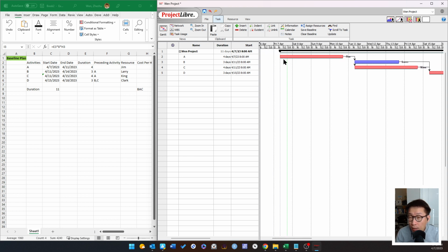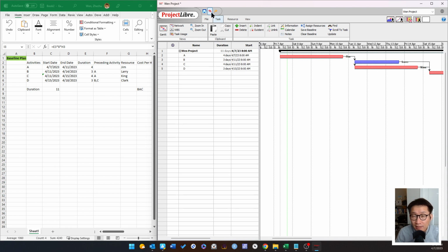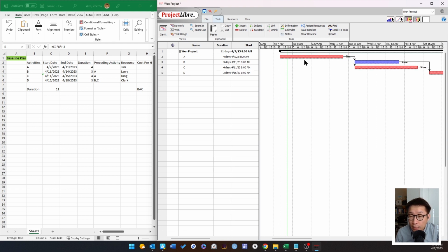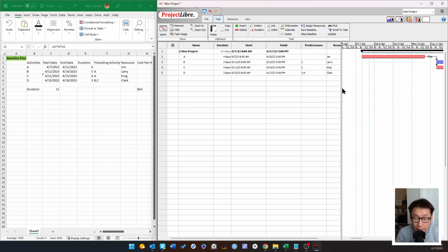This gray bar here, I don't know if you can see this or not, is basically going to be the placeholder that reminds you where your baseline was as the project progress changes. You'll see that later. As you can see, as I undo the previous step, which is when I specified the baseline, without specifying the baseline that gray bar is non-existing. But if you establish that as a baseline, the gray bar shows up. So I think we are almost done with all the basic setup.